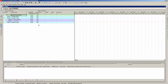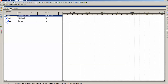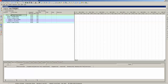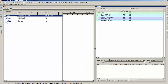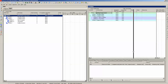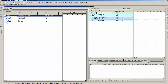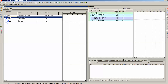One last helpful trick: we can display the activities view alongside the WBS view using a split screen. For this to work, you must have the WBS tab next to the activities tab and have the activities tab active. Select View, Tab Groups, New Vertical Tab Group. This creates a split screen where we can view our WBS and also view our activities table with WBS elements listed. If we make a change to our WBS elements in the WBS view, we can automatically see that change in the activities view.